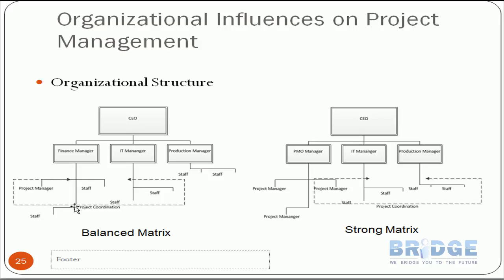In the balanced matrix, staff now reports to two managers: their functional manager and their project manager. Authority is balanced between both, which is why it's called the balanced matrix. However, this can create conflict in priorities, and staff still have their own daily operations alongside project work.